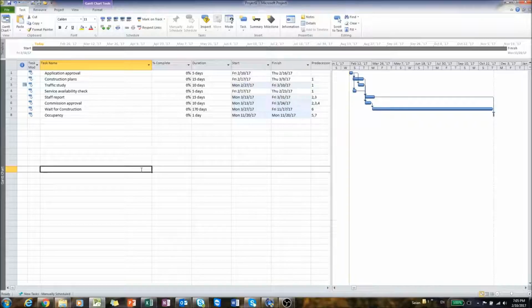So now what we're going to do, we're going to see how we can set milestones for a project. Sometimes for a project you have certain points that are very important, and we call them milestones, and you want to make them more visible. These steps are usually when you get the money from the upper management, so they are defined based on the times that you get the budget from the management. We don't have this one for the sample project that we had in slide 43.